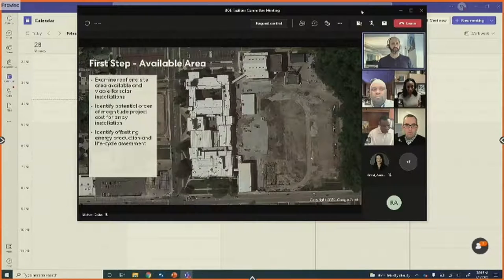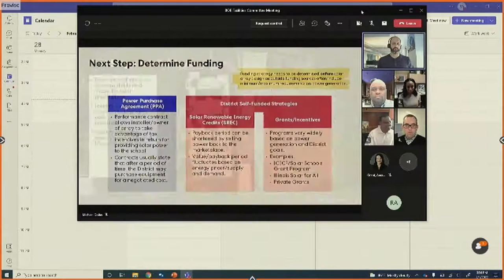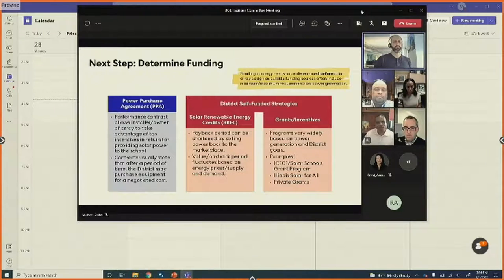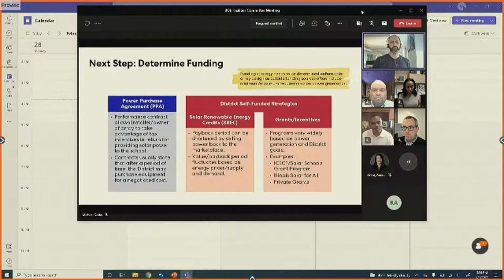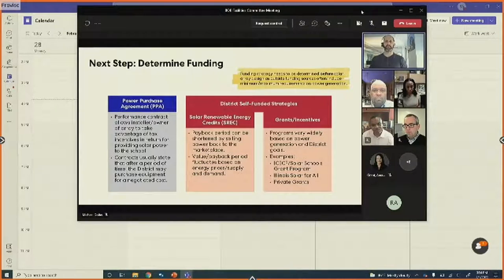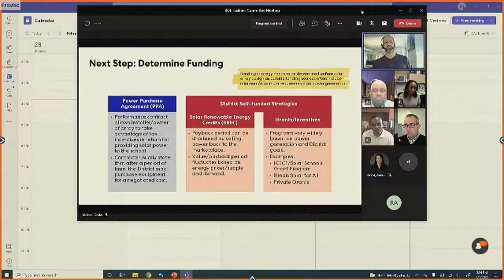The next critical step that goes lockstep with the initial design is to determine the funding strategy, because that will often impact the amount of solar that gets installed as well as its goals. There are district-funded and self-funding strategies, for example based on grants and incentives.